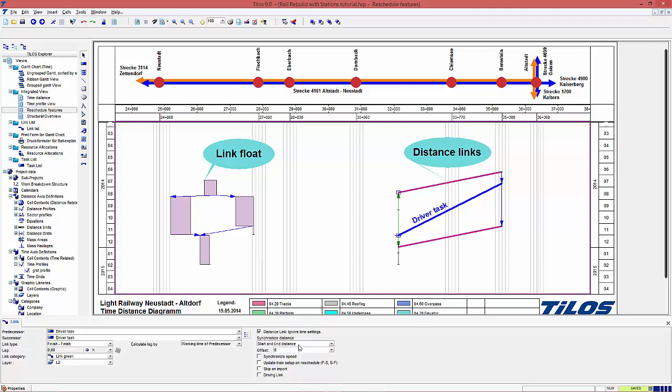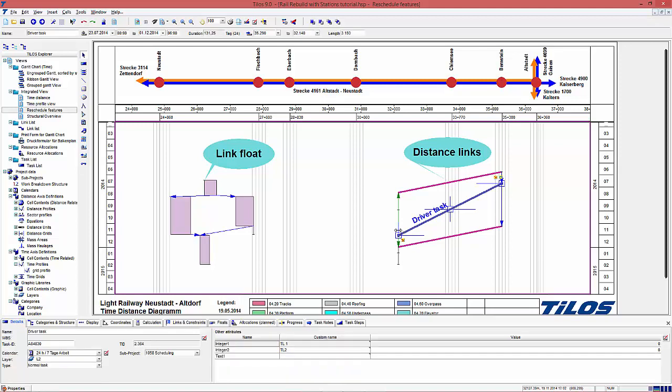Those purple tasks go before and after the blue tasks, which could be a machinery work that defines the working distance for all the tasks in the group. Changing the working distance can now control the previous and following task in distance too. This is done during reschedule.